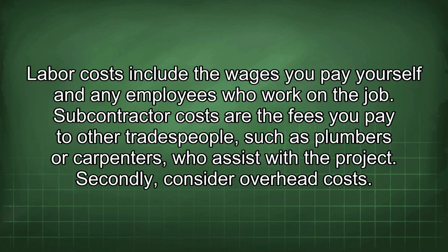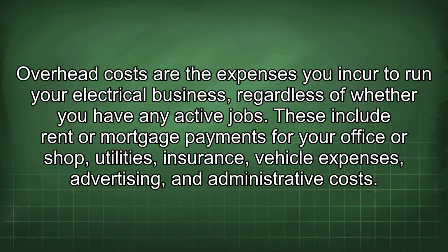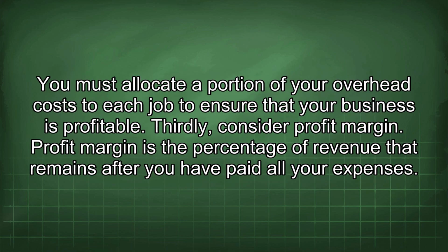Secondly, consider overhead costs. Overhead costs are the expenses you incur to run your electrical business, regardless of whether you have any active jobs. These include rent or mortgage payments for your office or shop, utilities, insurance, vehicle expenses, advertising, and administrative costs. You must allocate a portion of your overhead costs to each job to ensure that your business is profitable. Thirdly, consider profit margin.